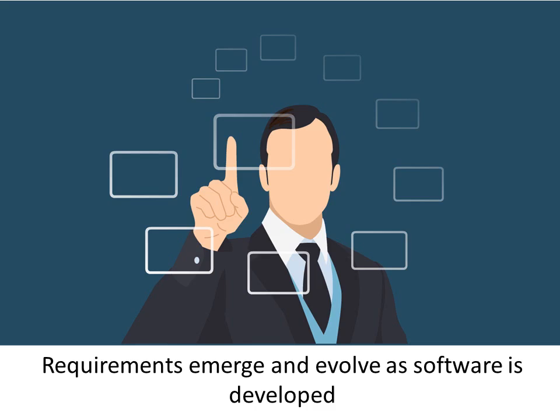So unlike in the traditional project management approach where the team is resistant to change because they are bound by the triple constraint of scope, time, and budget, and because the plan is made ahead, they resist change requests as much as possible because those are bound to delay and increase the cost. Whereas in Agile, you look forward to getting more inputs from users as the initial iterations happen. You want them to use it and tell you which ones they need and which one maybe is not so important. So this is quite a shift in how things are done, and change is good, and change is accepted and adapted for the success of the project.